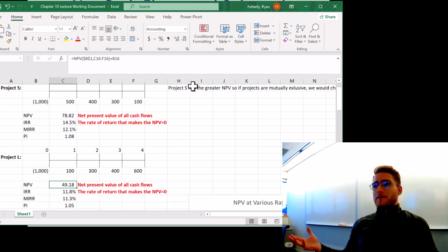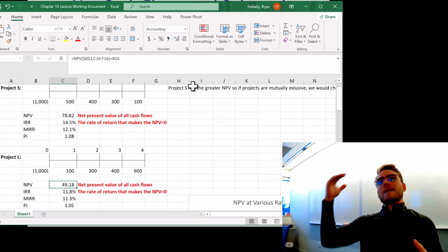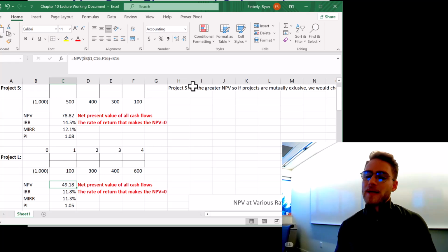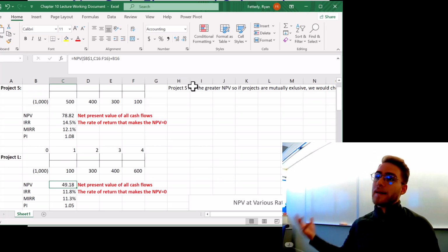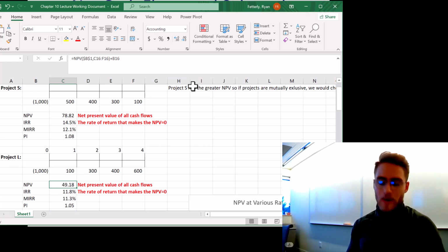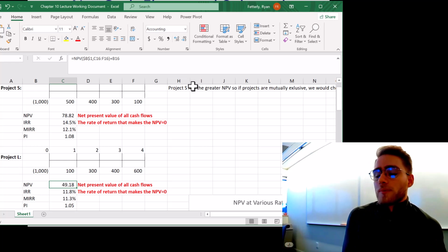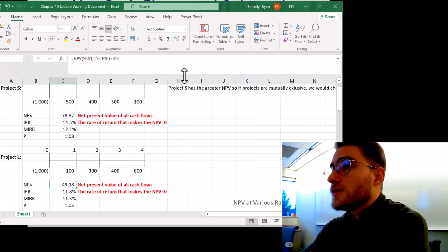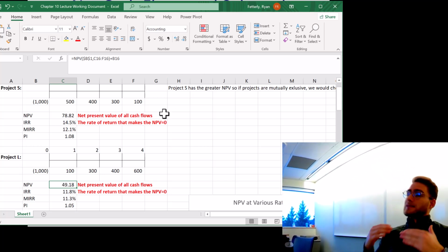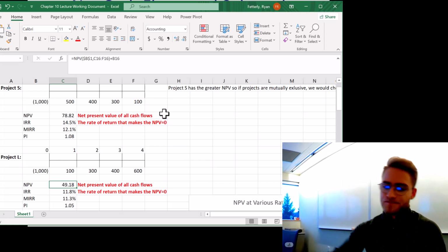Now, say you only have $1,000 to invest, right? It's not so simple anymore because I can't take both projects. I can only take one or the other. So in that case, you would say, okay, give me the $78.82, aka I'm going to invest in project S, and I'm going to table project L. Maybe I wait till next year and I reassess project L, and maybe that's the more profitable project next year, right? But I do not have $2,000 to invest, so I'd have to pick project S because it increases the firm's value in today's dollars by the most. Okay.